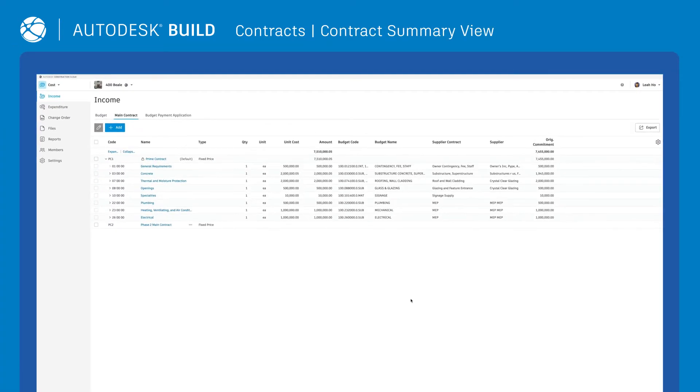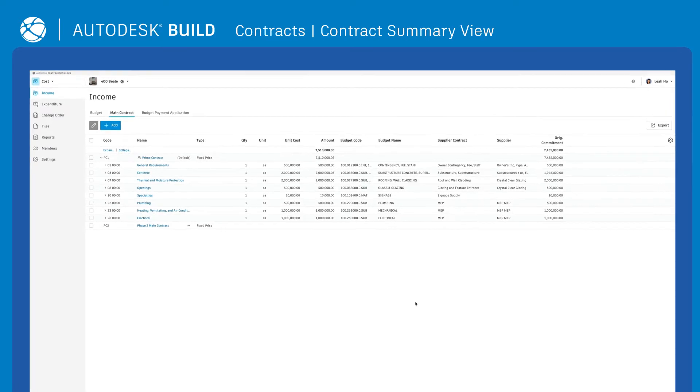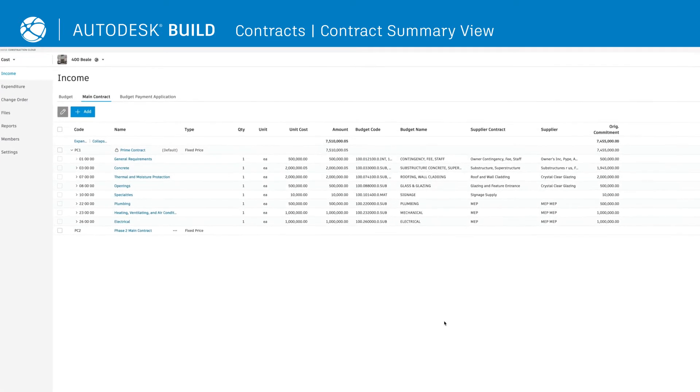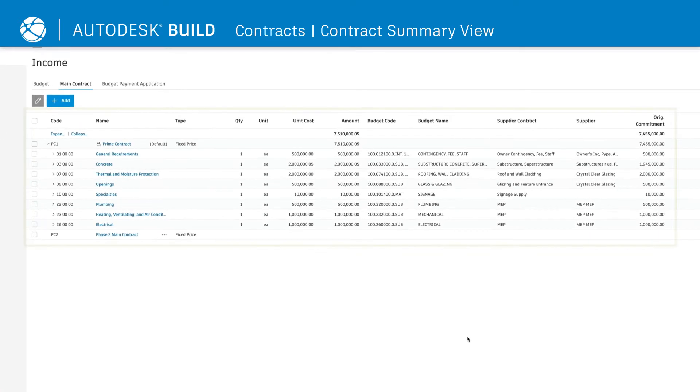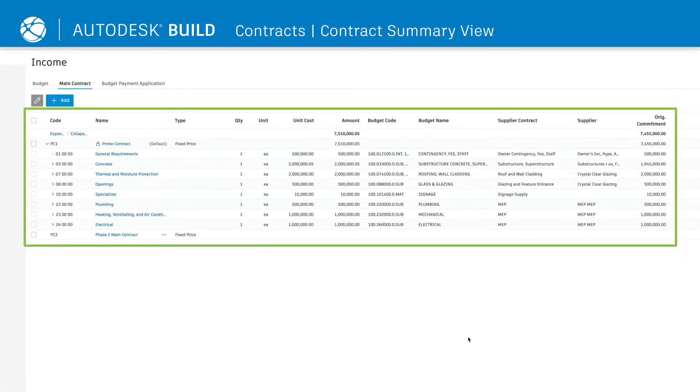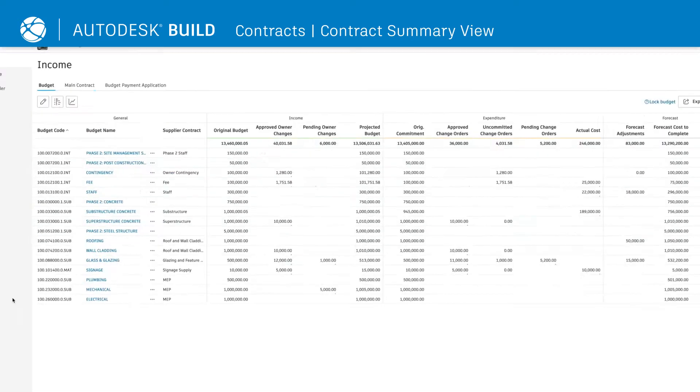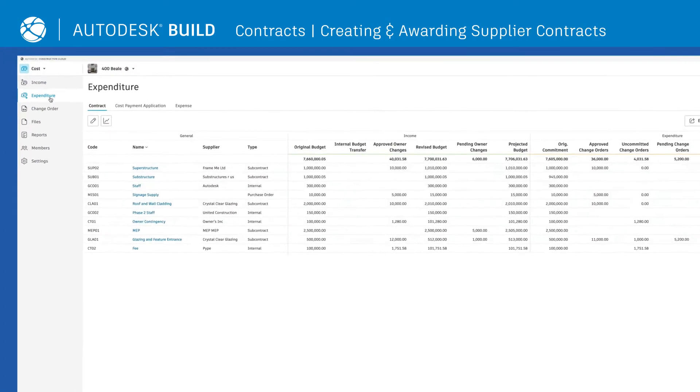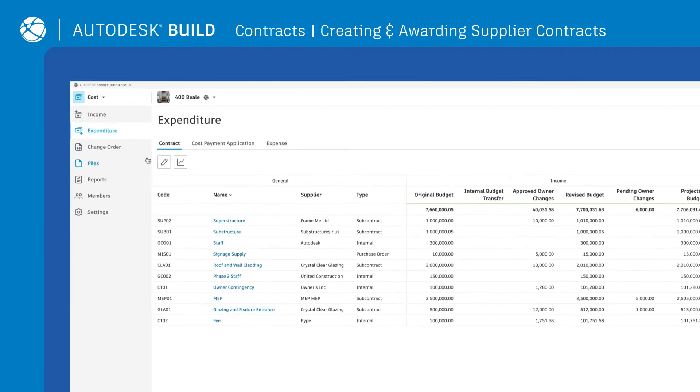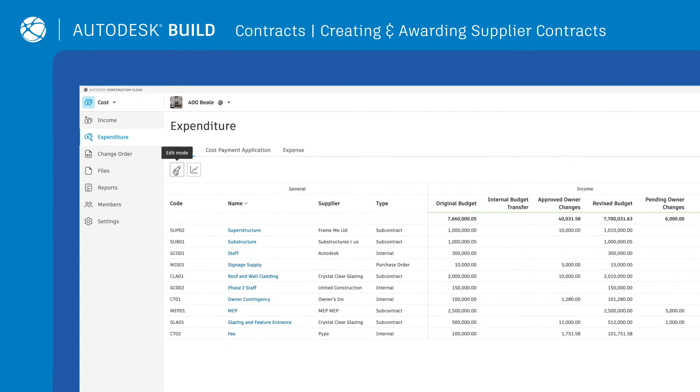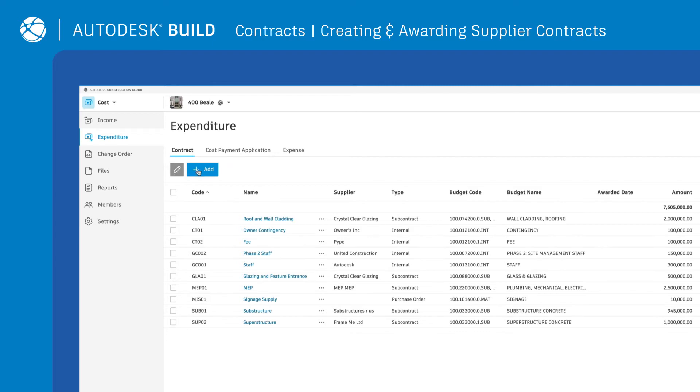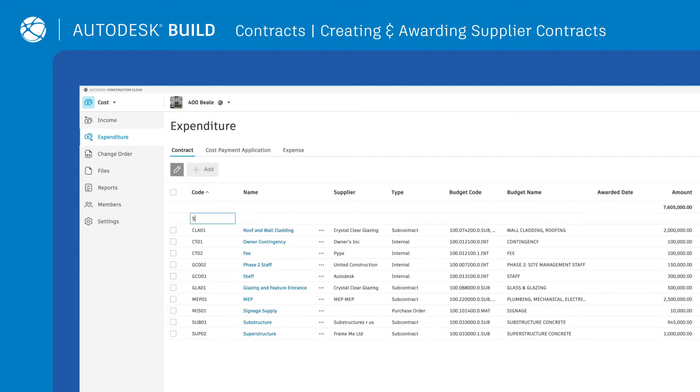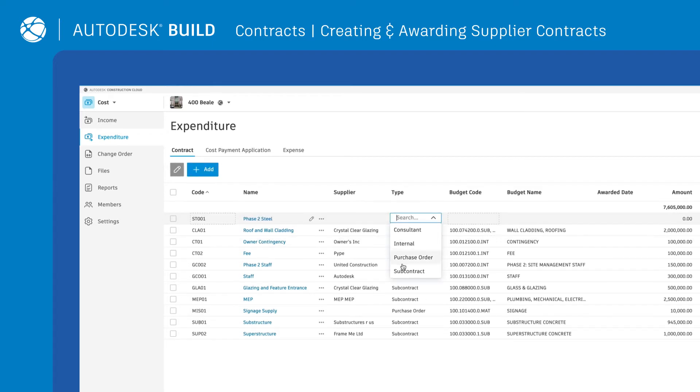Once the main contract and schedule of values are created, you'll see all of the information in the Contract Summary view. To create supplier contracts, click on the Expenditure tab, enter Edit Mode, and either add necessary details, or import an Excel list.